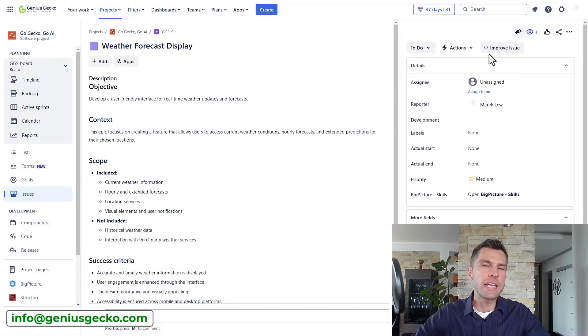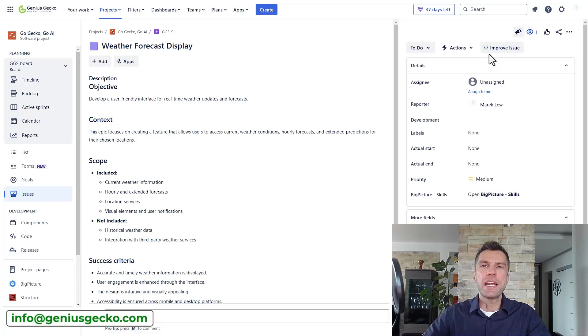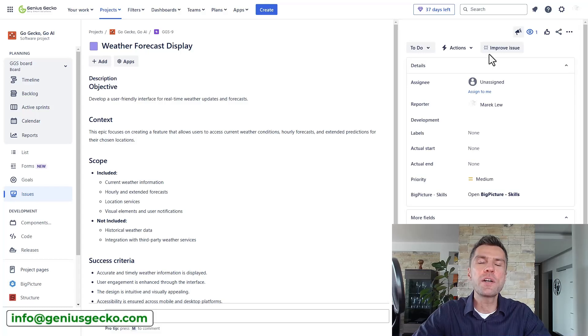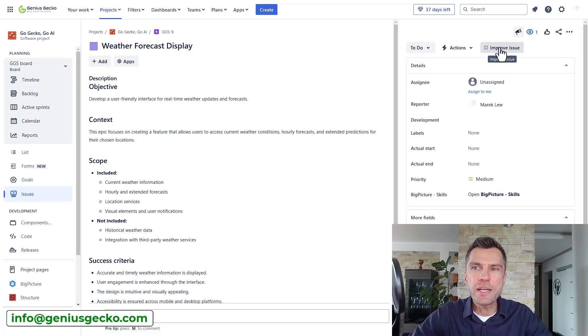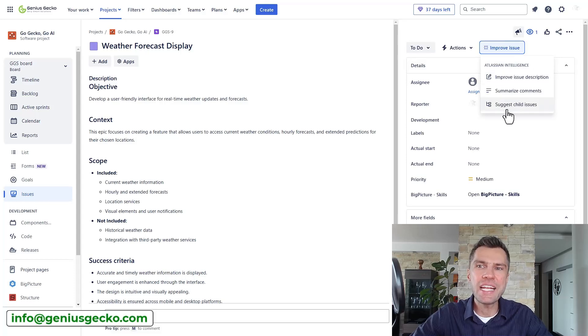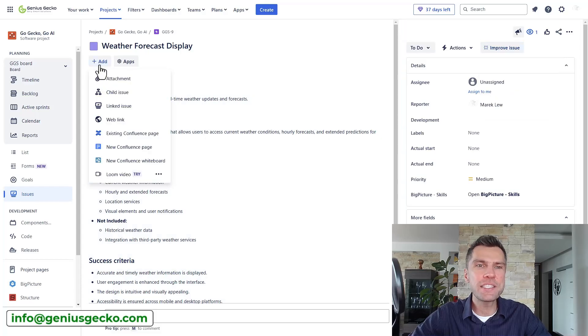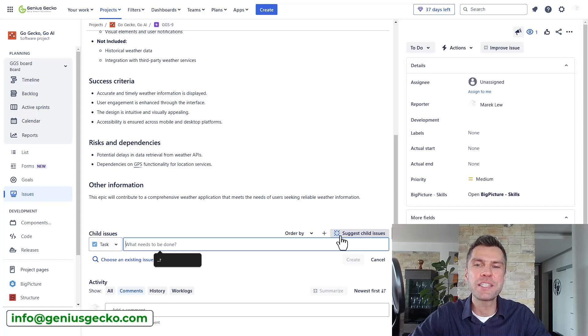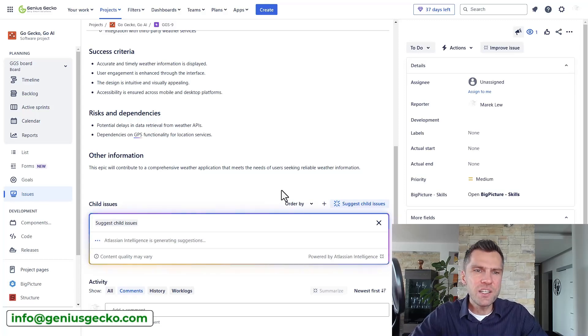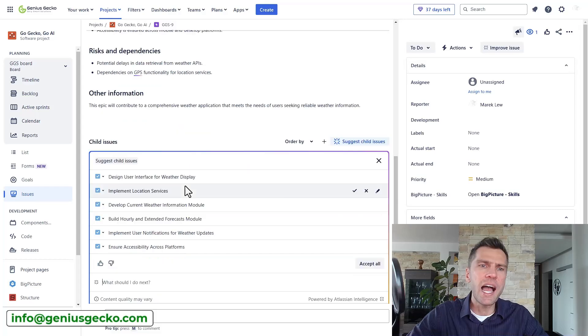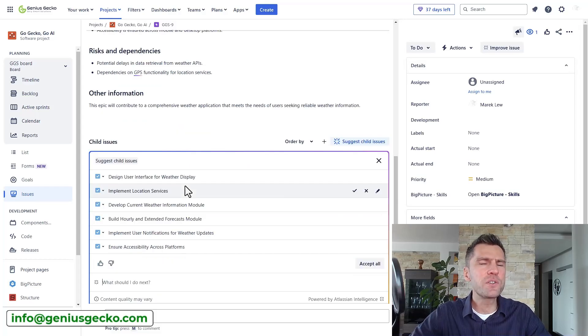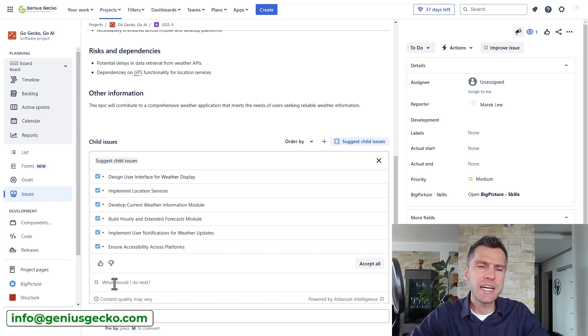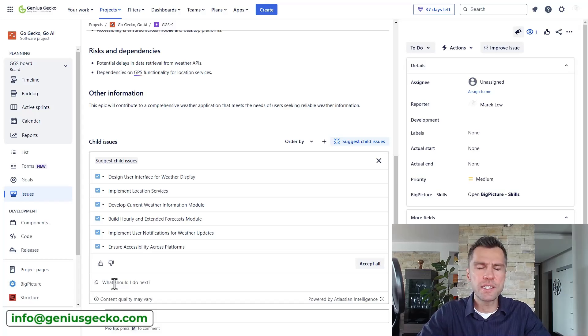Now the next thing that I also really like is the ability to break down the upper level items. In my example an epic or a story into tasks, or in other words create a work breakdown structure. So again you can use the improve issue button right here and ask Jira to suggest child issues, or you can use this add button here. And when you select child issues you will also see the already mentioned icon with suggest child issues. Now let's click on it and what I observed here is that it's not really that intelligent at that point. I would expect to create stories. Now I haven't tried it with default issue type story but I can add a prompt to reformat this into a user story format. So let's give it a try.